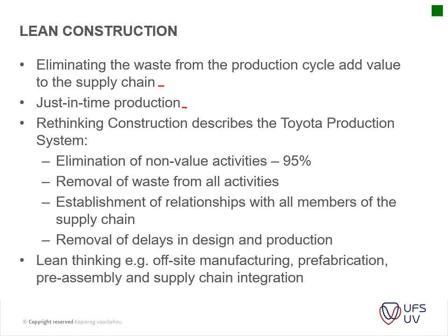It's delivered usually a day or two before it's actually installed, and thus you do not have to have a big site to store all the material. You also do not have to pay for storage containers and so on for prolonged periods. It also means that the risk is transferred to the supplier and the transport thereof.